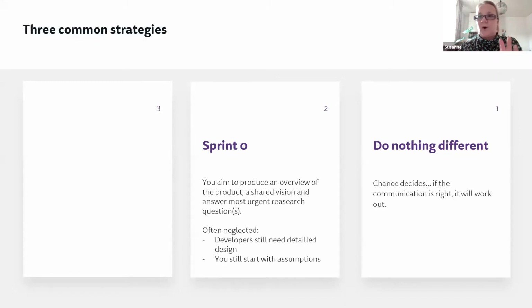The Sprint Zero, I think you also know this. This is a strategy where you ramp up a project. So you do all the fundamental UX work beforehand. You lay out the navigation, you research which personas you would address with a product, you sharpen the product vision, and you do all the fundamental stuff. By the way, Sprint Zero is also very interesting for doing the IT baseline stuff, so looking at the IT architecture, what to do to implement the product in the upcoming sprints. So Sprint Zero is something you can do because there's also a fit with the IT demands.